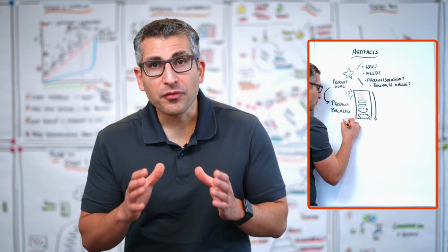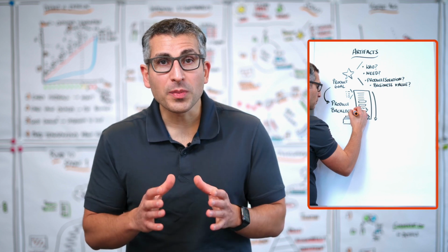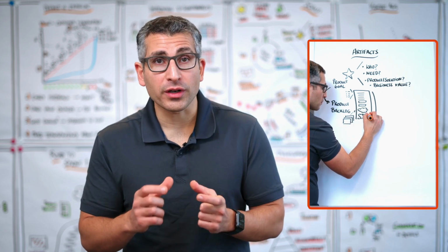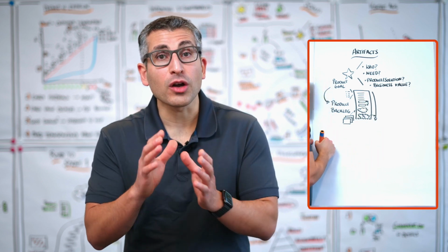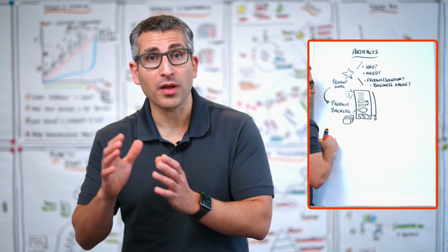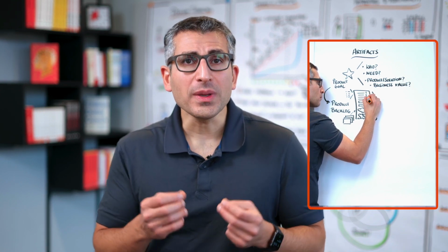Second, every product backlog should be considered being a living document, which means we will constantly reorder the items in our product backlog, and we will add new items to the backlog and remove some older items from the backlog. Last but not least, we would want our product backlog to be estimated, especially the top part in that product backlog, so that a product owner can make predictions and that a Scrum team as a whole can also estimate how much work they take into a particular sprint.